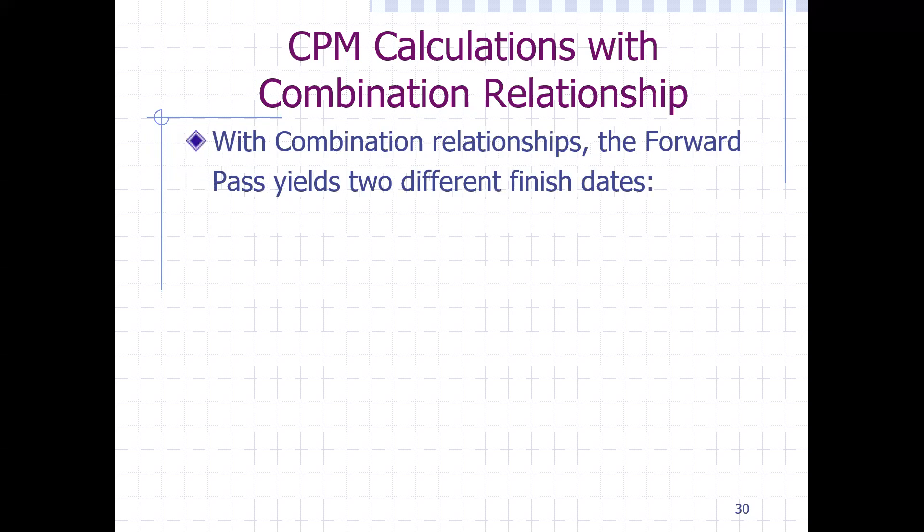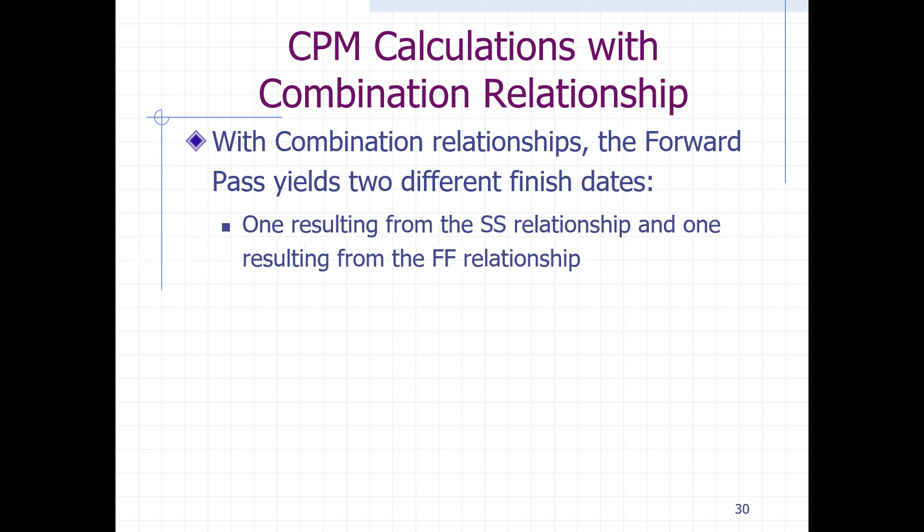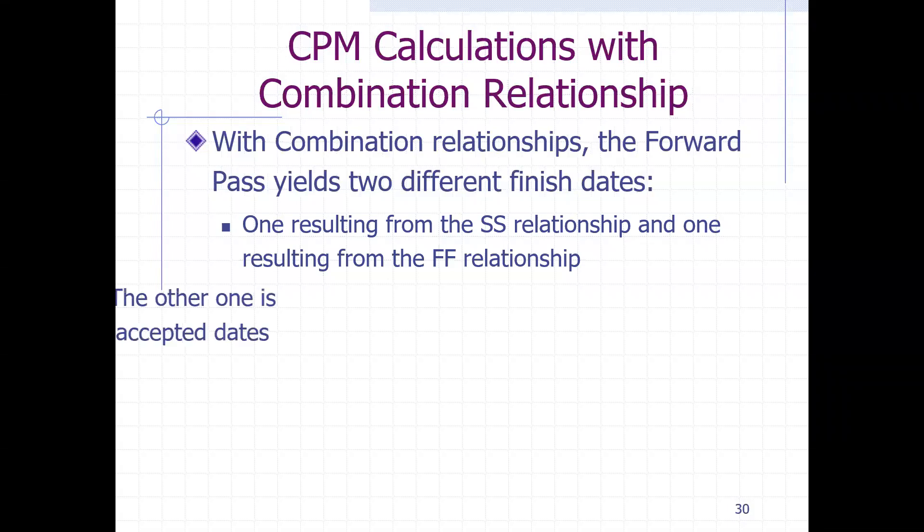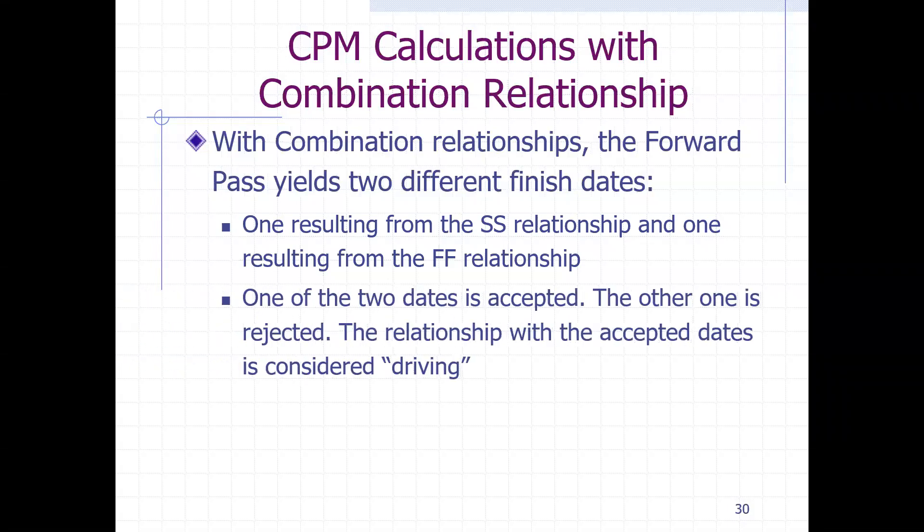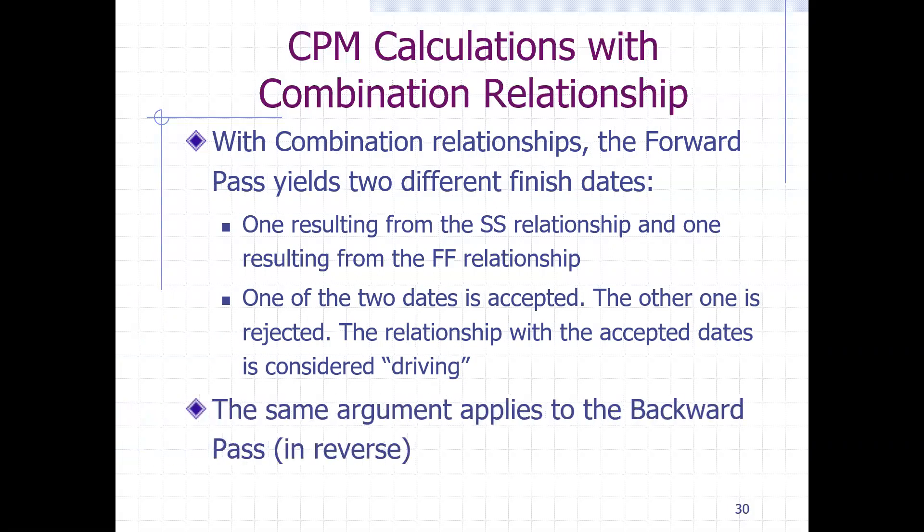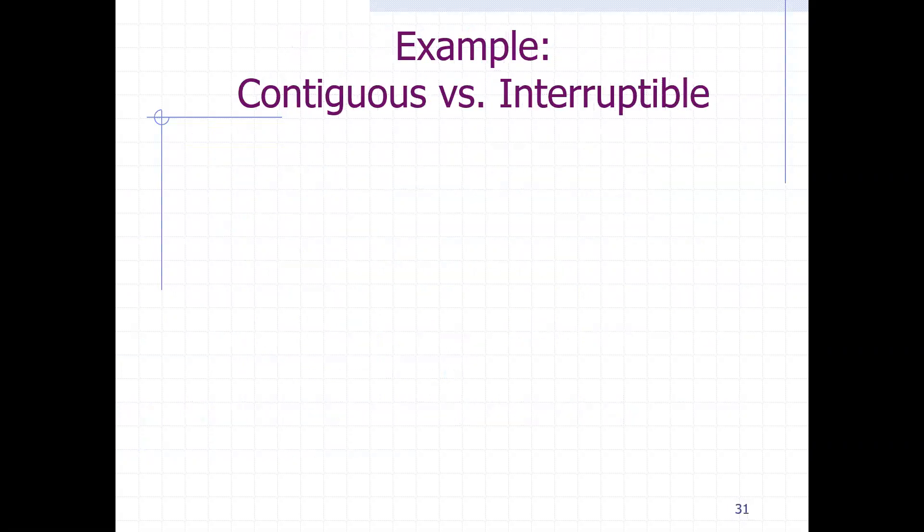So with the combination relationship, the forward pass, you have two different finishes, one resulting from the start-to-start relationship and one resulting from finish-to-finish relationship. So one date has to be accepted as the driving activity or driving type, and the second one is rejected due to unrealistic procedure. And the same goes for the backward as well.